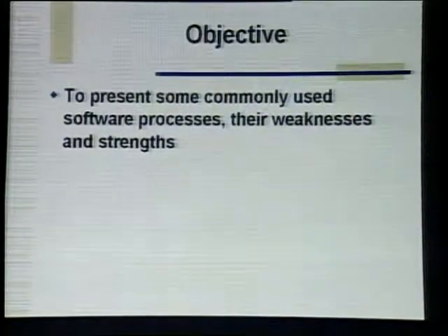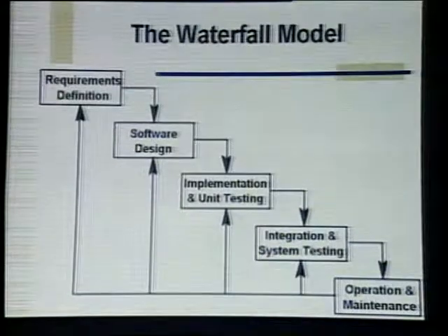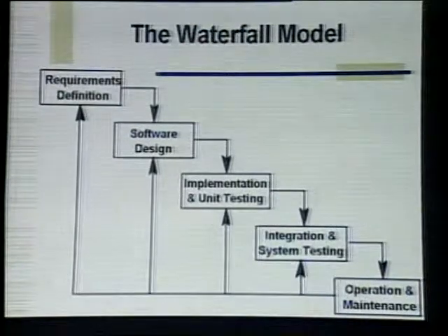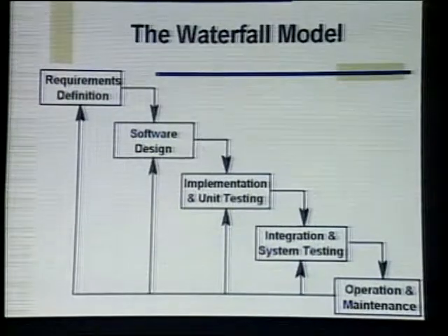Dear students, let's look back again on the waterfall model and see one of the major problems with that model. As you can see from this diagram, the software process model, known as the waterfall model, is applicable only if the user knows its requirement at the beginning of the project. But for large projects, knowing all the user requirements is quite a difficult thing. Users generally do not have a complete idea that what type of services they would like to have in their software.